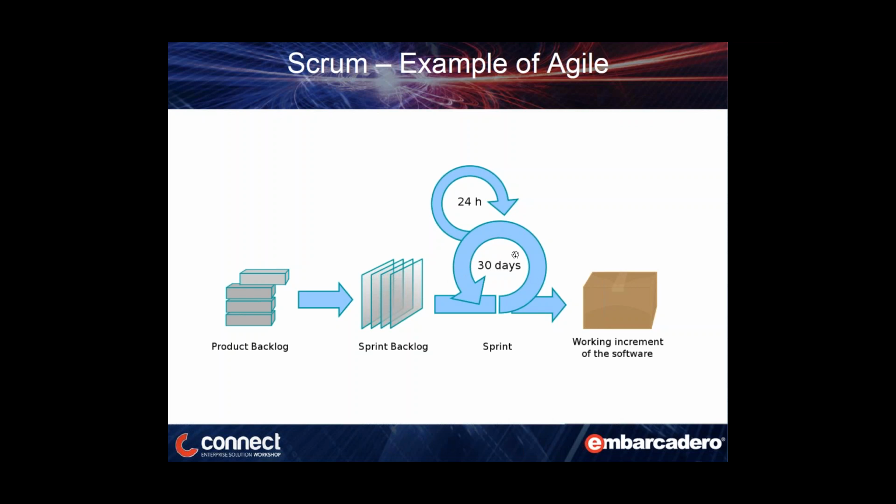But what's happening in that sprint cycle is that each day you have the idea of a stand-up meeting. And the stand-up meeting is basically between the project team, the product owners involved, as well as the Scrum leader, Scrum master, or the project manager. And basically you're going to tell them 3 things. You're going to say what you've done, what you're doing today, and what are your roadblocks. And the role of that Scrum Master is to remove those roadblocks. That is to sort of help. It's not to be a meeting that spends hours and hours and hours, but it's basically to tell those 3 things, so we can figure out how we can remove any impediments so we can keep working successfully.